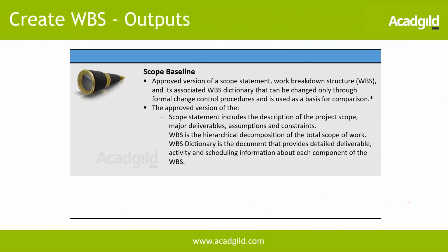Because once the WBS is created, we have all the work packages, which are all the deliverables, then we baseline the scope. So what is scope baseline? It's an approved version of a scope statement, WBS and its associated WBS dictionary. So let me talk about WBS dictionary for a while.